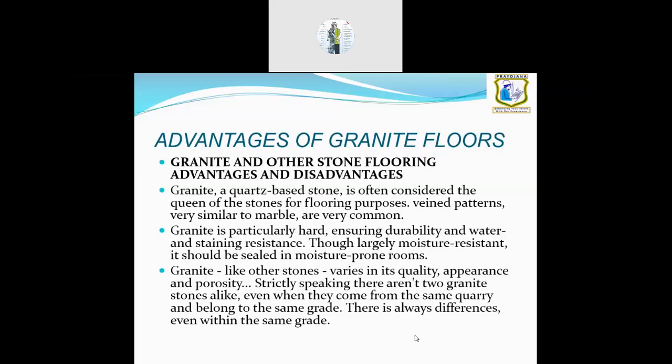That's why the laying cost of granite is more. They will charge you around 60 to 70 rupees for granite floor laying and 90 to 120 rupees for marble floor laying. So these are the prerequisites we should know when you are doing granite floor laying. Any doubts in this? The same 30 mm mortar thickness will be followed in this also.